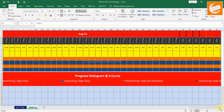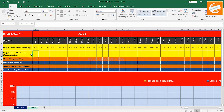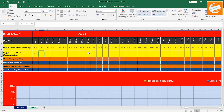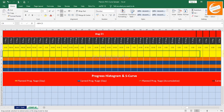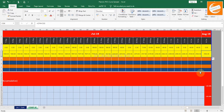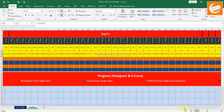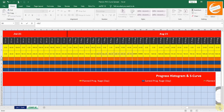Due to time constraints, we will define only the critical things. At the end there are also zero manhours. First, put a formula equal to zero manhours at the start, then move forward and put the formula equal to this cell plus this cell — that gives the cumulative value — and drag that formula to the end. Now you can see the cumulative manhours here.